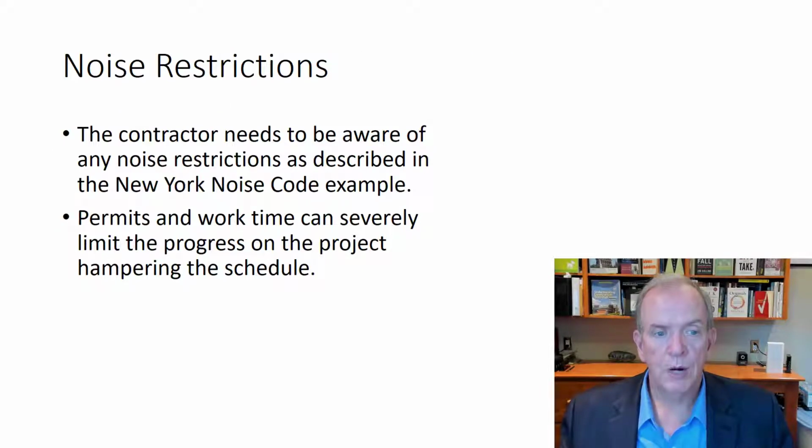Noise restrictions. Well, if you want to have some fun, Google New York noise code, and you'll see a pretty extensive document, with the noise code and the decibel ratings that you have to comply with if you want to do work in New York. You think you're going to work certain hours, or you fall behind schedule and you think you can make it up by working longer hours, it's very doubtful because you're not allowed to make certain noises after a certain period of time. And so a lot of urban municipalities will have their own noise codes and limitations.